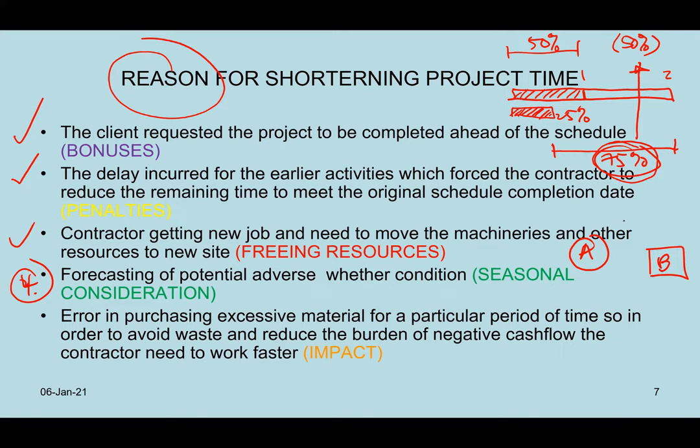So A is still in progress. When you are progressing, you are using equipment, manpower, and material. Let's give an example of equipment. Your equipment is still stuck at project A, whereas project B is now going to start, and you might need the same equipment. Otherwise, you have to rent that equipment. Let's say you already own the equipment, and it is being used in project A, and now project B is coming up. If that equipment is not available, then you are forced to rent the machinery,